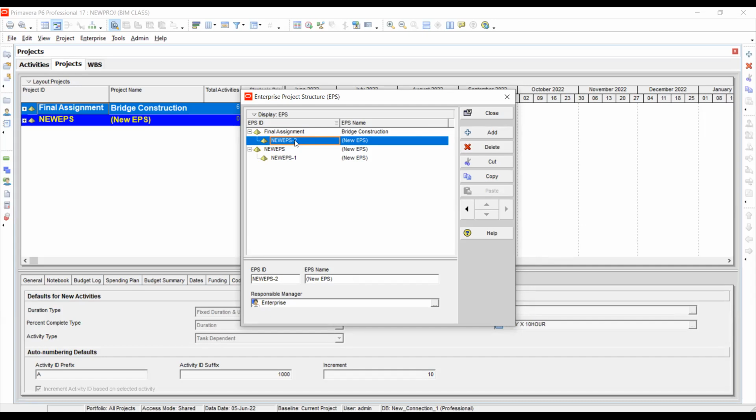It is the parent project, so it has the child projects, separate zones, zone 1, zone 2, or zone A, zone B, and each and every zone comes under separate project managers, or the zones may be divided into other projects. So it is easy for us to manage and do the works, allocate the resources, and prepare the programs and the work programs. Everything is easy when we divide the task, rather than doing one program for a 100-story project, dividing it zone wise and subzone likewise.